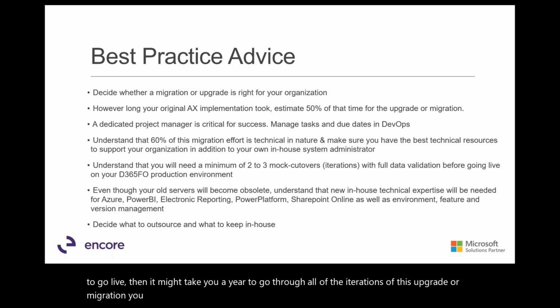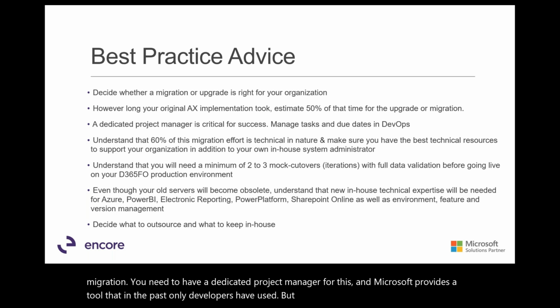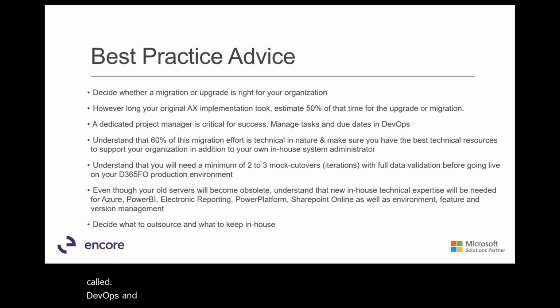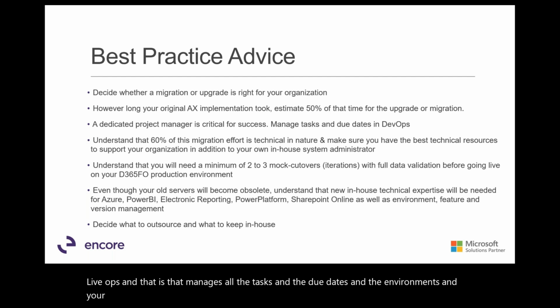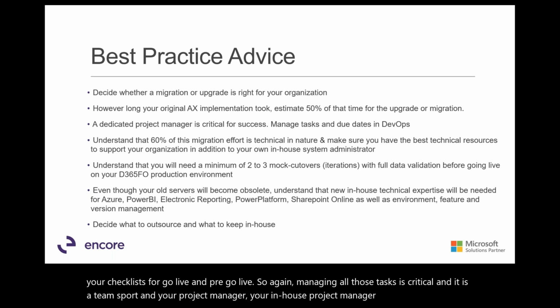You need to have a dedicated project manager for this, and Microsoft provides a tool that in the past only developers have used, but now all the users can have access to. It's called DevOps, and that manages all the tasks and the due dates and the environments and your checklists for go live and pre-go live. So again, managing all those tasks is critical, and it is a team sport, and your in-house project manager is critical to success of this process.